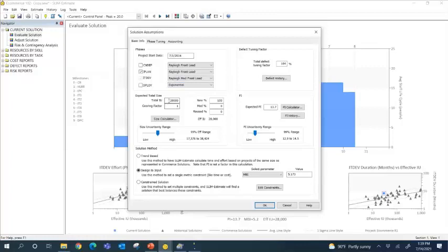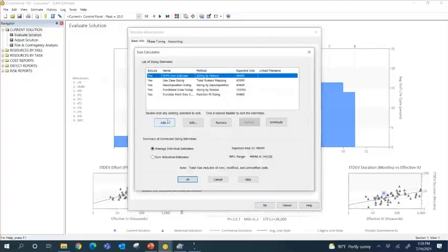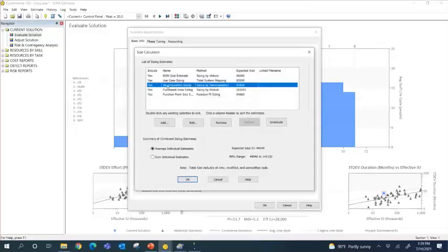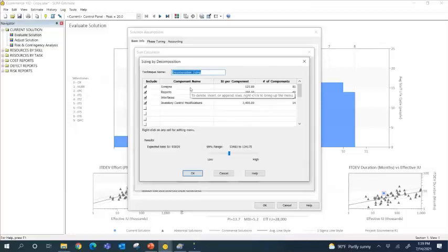Now in this example, we're going to go ahead and say the customer needs this amount of functionality, 28,000 implementation units. Remember, that could be story points. It's customizable. You can set that up however you want. And we can go a little deeper here if we want to, and break that out into more detail. We can say, okay, this is how many screens, or this is how many reports, or this is how many interfaces. That would be using your own historical data, right, based on work you've done in the past.